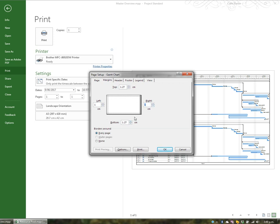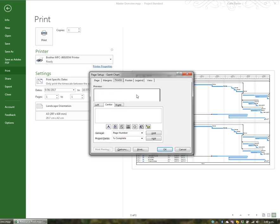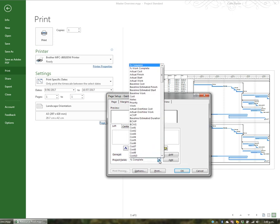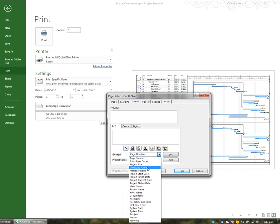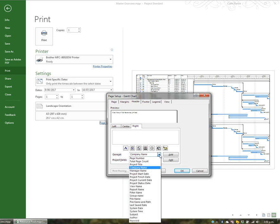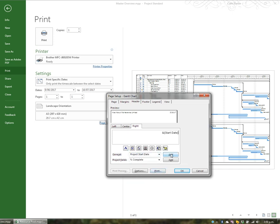You've also got a border around the outside of every page. The header and footer is text that appears automatically at the head and foot of every page, and what you show in the left, centre or right of the header can vary. In the left header of every page I may want to show the company name. So I'm going to choose general fields and select company name — it gets that from the project information advanced properties we set up earlier. I'll add that and there you see 'Mad About Maintenance Limited'. In the header right I might add the project start date.